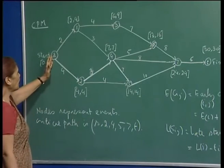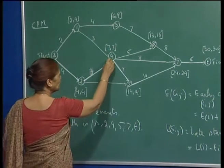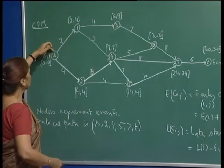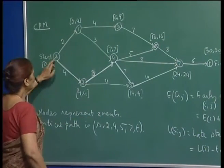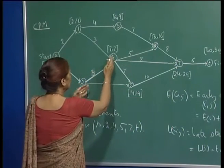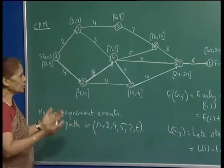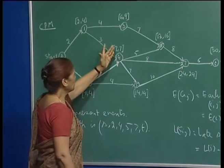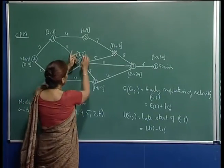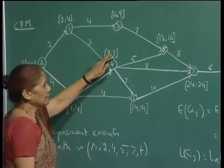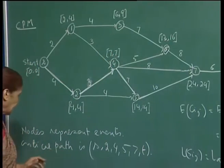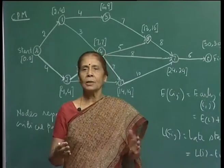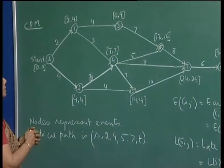Nodes are events. For example, node 4 indicates the completion of activities 1-4 and 2-4. Activity 1-4 cannot begin until node 1 is complete, and 2-4 cannot begin until node 2 is complete. So node 4 represents the completion of all preceding activities. The late start value at a node tells you that you must not arrive there later than that time, or the following activities will be delayed.